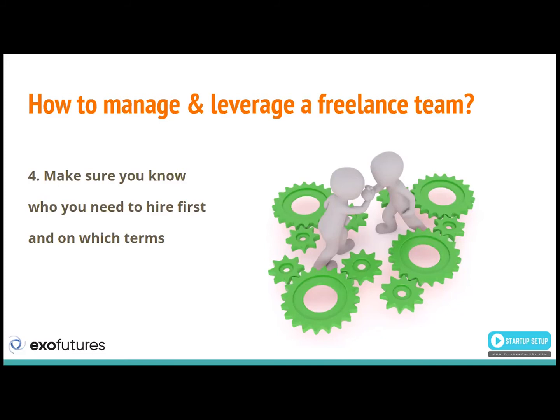Then you have this arrangement of having an expert available to you on demand. I suggest this with a software architect, for example. In my experience, in the beginning that's usually up to 5 hours of consulting that this kind of expert would provide. But it's important that this person stays available to you whenever you are thinking about making some major change, because they know the core of your product, so they don't need to go again into learning about your idea and what you have. They are the ones who suggested the initial solution, so it's good if you keep them in the loop.